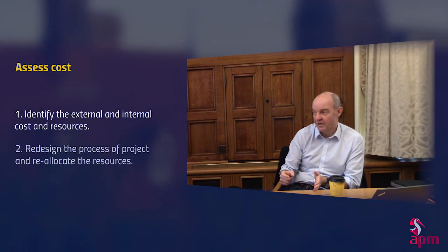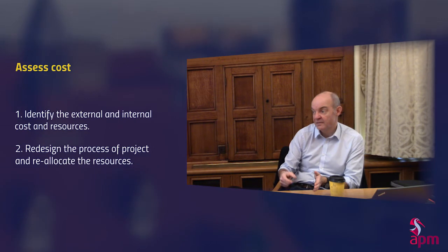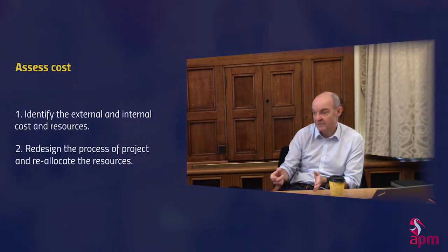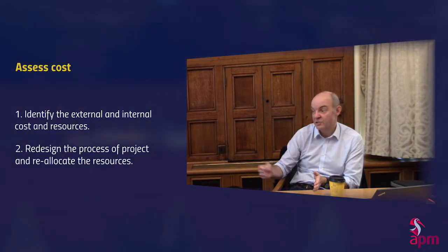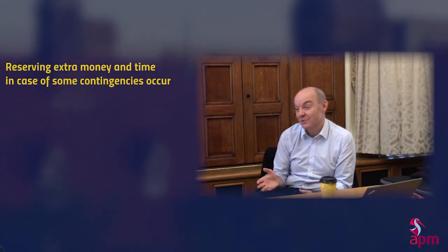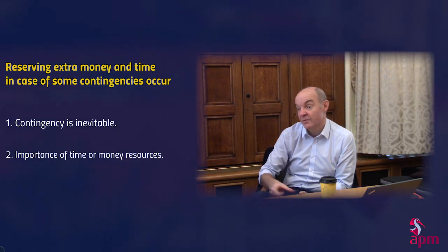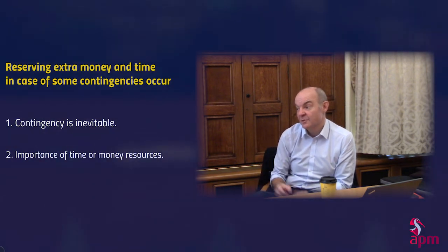And then part of our PID, part of our project's design documentation, was as if we find areas of the projects that need extra resource, then we'll get those signed off. So there has to be contingency in every project. In this project, what we have is more time. So we have our contingency in time rather than money. So we can take longer.